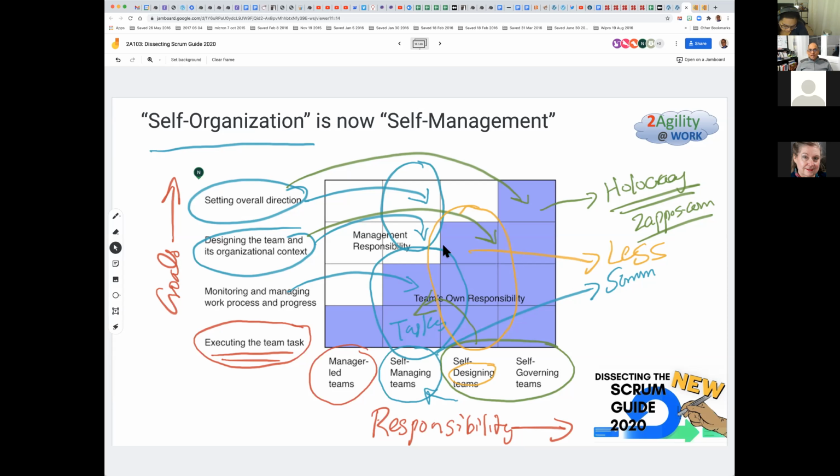One of the fundamentals in Scrum is that the whole team collectively should have all the skills required to do the work, or acquire them. If you're not able to do that, you can't do the work. So if you throw a random person onto the team, the team becomes imbalanced. I've had teams totally reject people who were joining because they did not have the necessary skill set, nor a pathway to acquire the skill set that was deficient. So it has happened at a one team level. That is what you want in design.